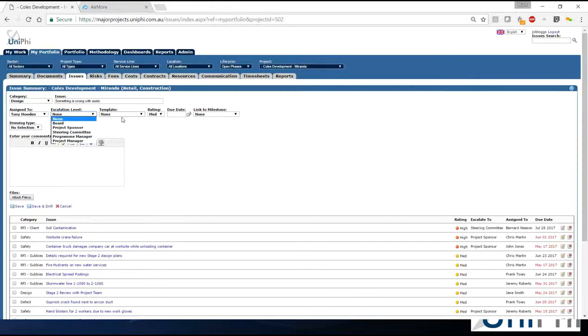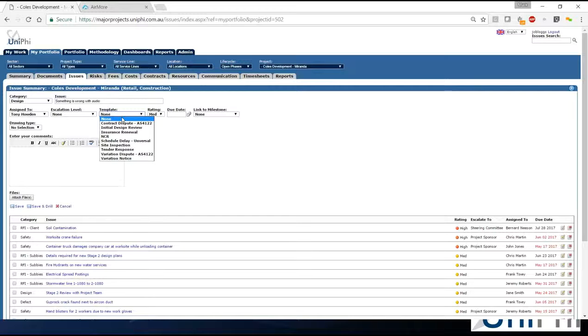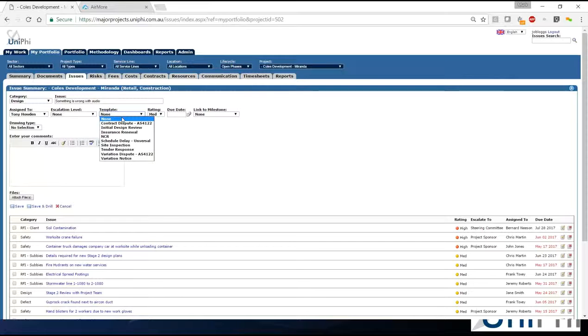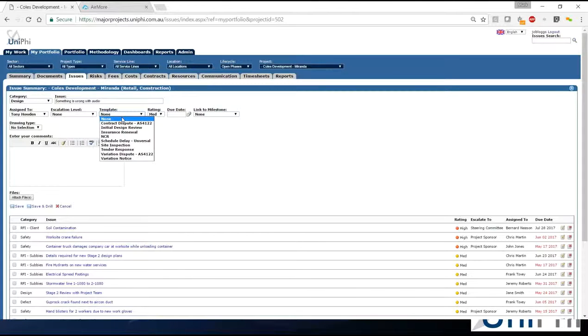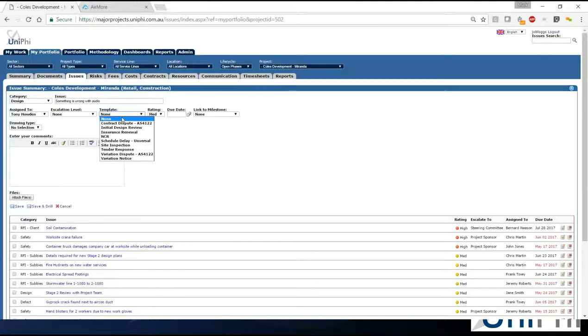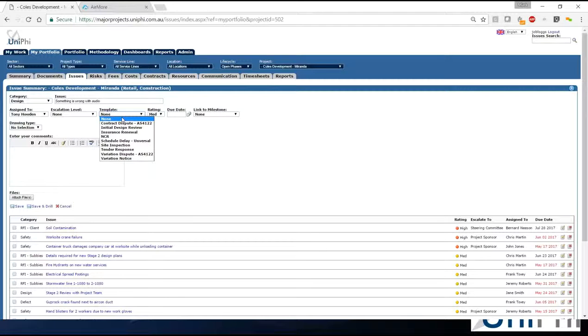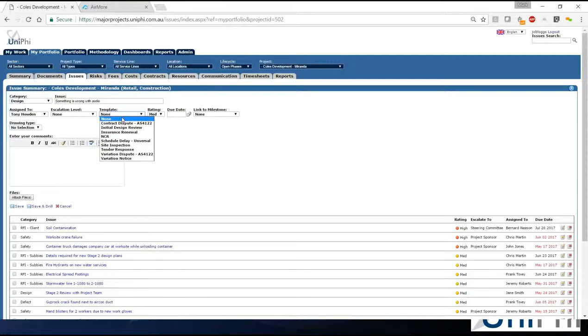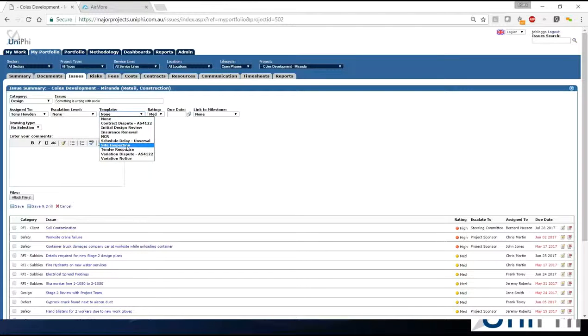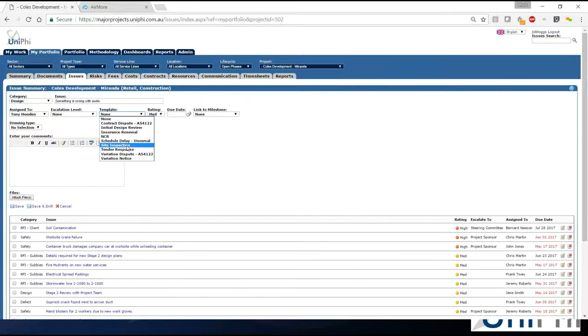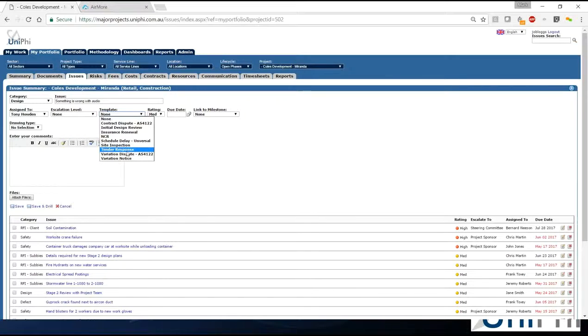Issue templates enable you to set up standard sets of actions in response to an issue. Typically, they're used when the issue is being logged of an operational nature. In one program, they had to track performance in response to progress claims or contractor invoicing, and they would have a set number of tasks they had to do to actually get packaged up all the contractors claims and submitted to the client, which was a government client. That sits behind this is a number of actions. Those actions automatically get assigned to people in those roles, and you can set up a standard response time, two business days, three business days, four business days.